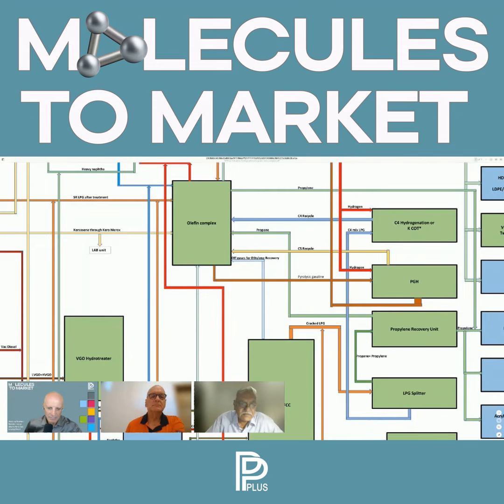Will I be able to source everything domestically? What would be the items I will have to import? So I need to have that so that I can also work out what could be the foreign exchange component. So these things are extremely important to look into the taxation aspect and the transportation aspects to work out the total cost per se.